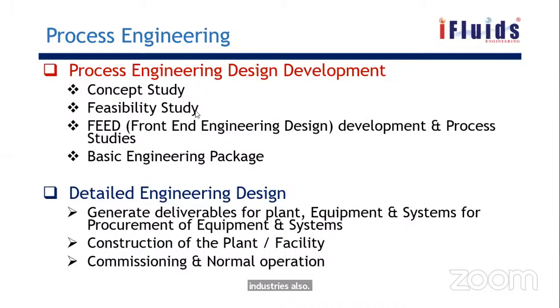These things, whether we can put the industry there in Punjab, are all studied through the feasibility study. They will look at different factors: environmental factors, government and local regulations, land availability, ambient conditions, whether people are available for the work, whether local people support the industry, and the development of the local area.